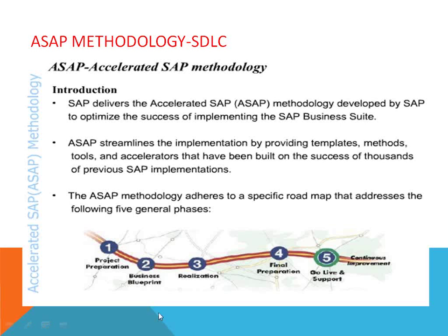It starts from project preparation. So how is the project prepared? Let's say XYZ organization is a $1 billion organization, and they have decided that they want to go into SAP ERP implementation. Before the project, they have already decided and prepared the project, and they bid for the project with four or five companies. One company, let's say, wins the project, and after that they plan the project: this is our $20 million project, and this implementation will last for two years. The project has been prepared.